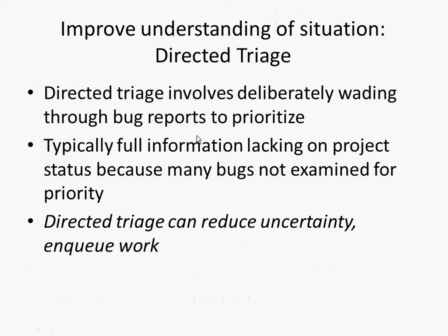In the sanitization process, we're often prioritizing as part of sanitization. And then in the triage process, we may fill in any missing information, and we're going to decide, are we going to fix this bug or not? Does it become an important bug, or is it merely an active bug? Or does the STI get thrown out altogether?